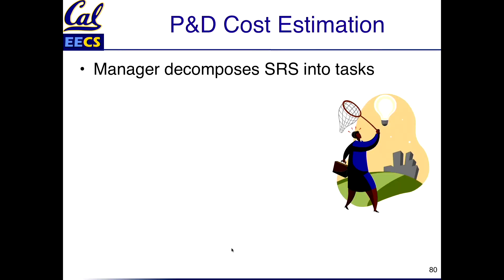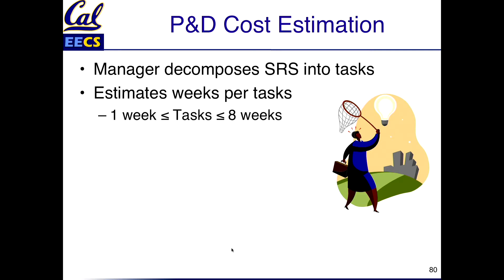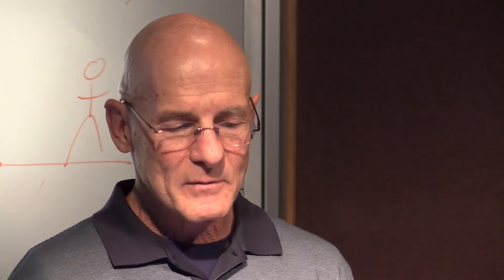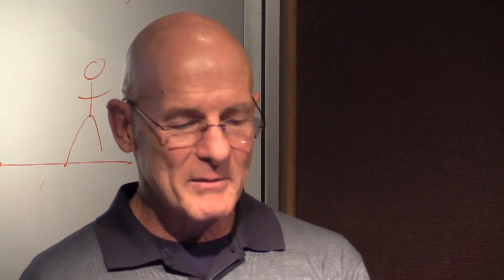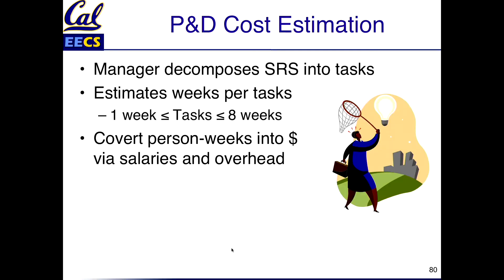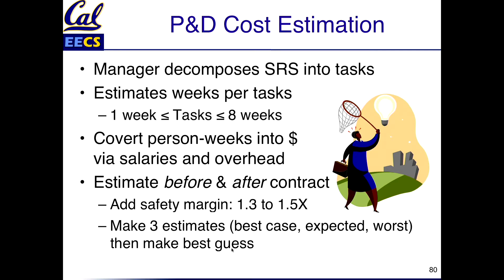How about cost estimation? The manager decomposes the software requirements specification into tasks — similar to points for user stories. You want to bound tasks between one and eight weeks: more than eight weeks is too big, less than one week is hard to schedule. Given the task estimates, you convert those into dollars via salaries and overhead. You do this before you get the contract and after — you want those cost estimates to be similar: what you bid to get it, and what it's going to cost the company to build it.